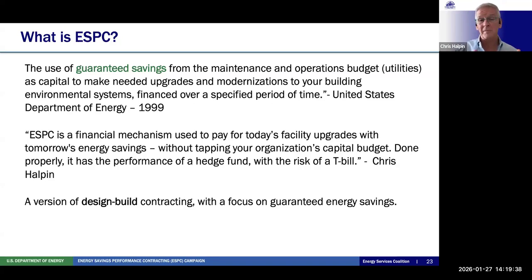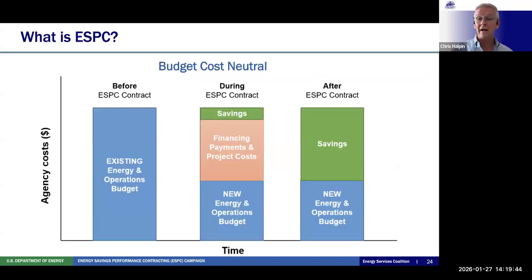schools. So it really comes down to being highly focused design-build contracting with a focus on guaranteed energy savings that you don't get in any other part of this business, right? So you build a new school, you renovate a school, there's no guarantees whatsoever from your architects, your builders, commissioning agents, nobody, right? You do this through performance contracting, you get guarantees on the performance and on the pricing. No change orders unless you dictate them.